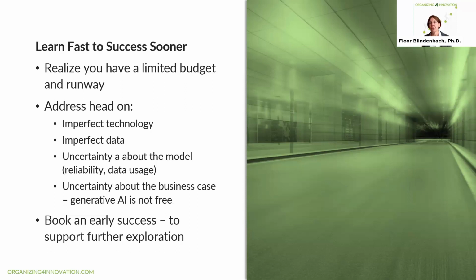So you need to, at the start, if anything, sit around and discuss the things that will be challenging and that you presumably don't know yet, so you can address those head on. Because that way you learn much faster if something will fail or will work or won't work. And so that then you can pivot.